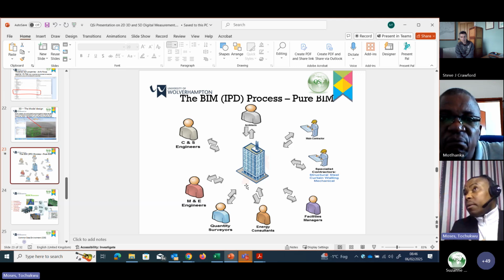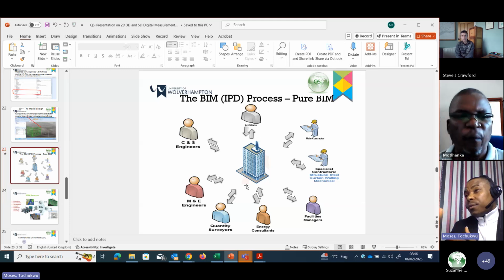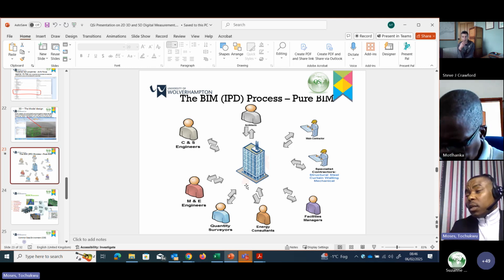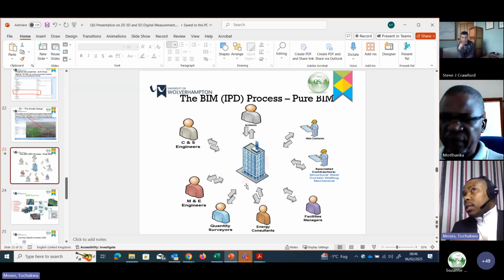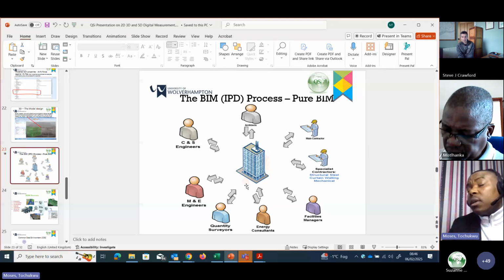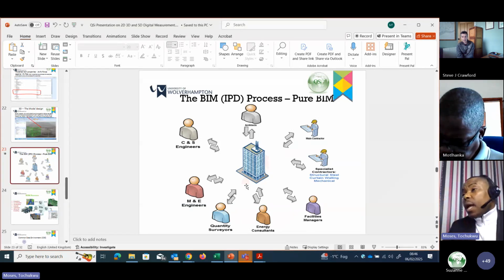So he said it had come as 900 and this was going over the cost ceiling that they had put together. And they were like, if they design this thing to be 600 diameter, will it not do the same work that this 900 would do? And then in the end, they agreed with the design team that yes, I think you guys are right. And they just cut down from 900 to 600 and that saved them a whole lot of cost.